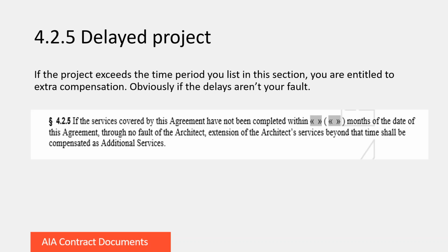And it's important with this section to understand that what's referred to here is the date of this agreement. So when Marika was looking at the cover page, the first blank that you fill out on this form is the date of the agreement. You want to make sure that you understand the significance, because it may be something that needs to be coordinated with the schedule, especially as it relates to this section in 4.2.5, to make sure that the duration, as it's running from the beginning date as the date of this agreement, is understood as implicating the architect's basic services.